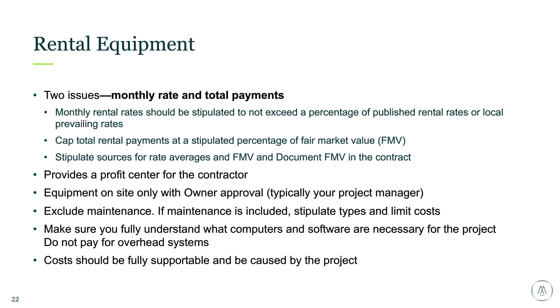Monthly rental rates should be stipulated to not exceed a percentage of the published rental rates or local prevailing rates. Cap total equipment rental payments. If you look at your contracts and you don't cap them, you should. We often find that maybe the rates are okay, but if you have a long project, you're paying more than what it would have been if you would have just purchased the asset yourself.